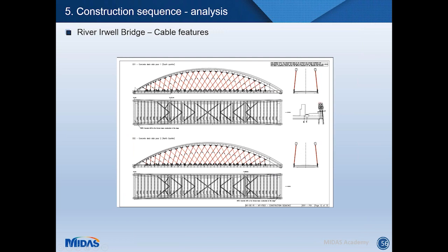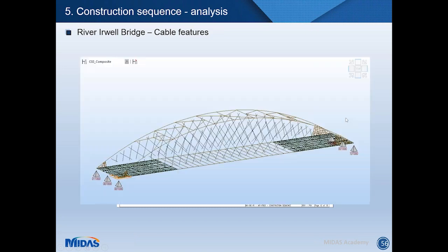Okay, it's then time to pour the concrete deck. So far, the formwork was there, but no concrete deck was poured. The pouring sequence was divided in 4 parts: south, north, central, south, central, north. And this is done through the construction stage in the very same way we've just seen. So these are elements that are being activated. It is important to activate, however, the wet concrete before to clearly capture the deformation of the structure again.